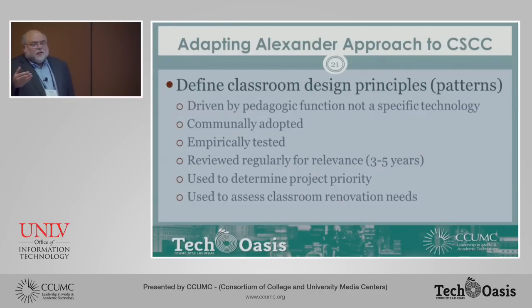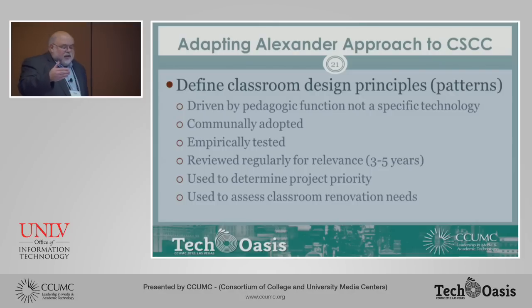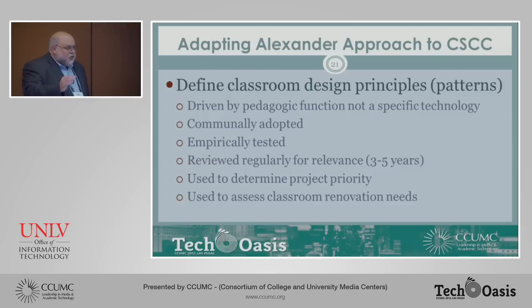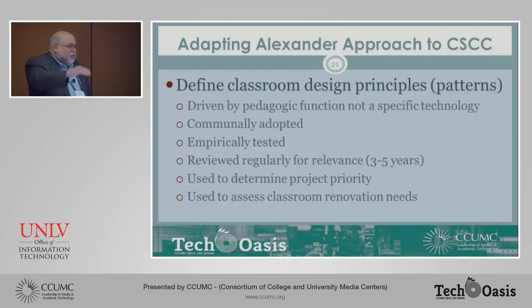We wanted to take the same approach and find classroom design principles driven by their pedagogic function, communally adopted so that people buy into them, tested wherever possible, and reviewed regularly for relevance to make sure they're still pertinent. We wanted to use them to determine priority among projects — a project matching our principles gets higher priority; one that doesn't gets sent back to the drawing board with a copy of the standards. We also want to use the principles to actually assess spaces to determine those priorities.